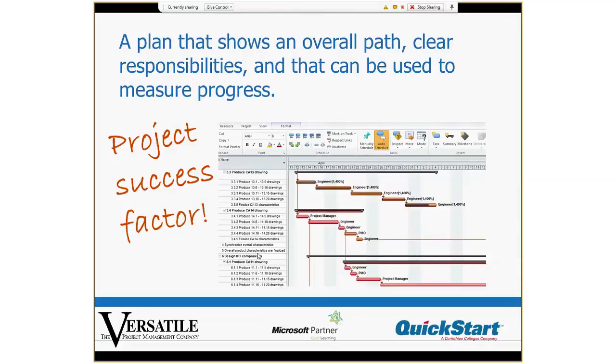But in reality, the question for you is, what do you want to do? Because you can configure MS Project files to actually be visible and accessible through SharePoint. Let me say that again. A Microsoft Project file can be synchronized to SharePoint so that you can make it visible and accessible to everybody on the team. So if you want individuals, team members, to update their own project status, you can set that up using SharePoint and Project together. That's why it's such a powerful combination and why we like it so much. Thanks for that question, Ruth.